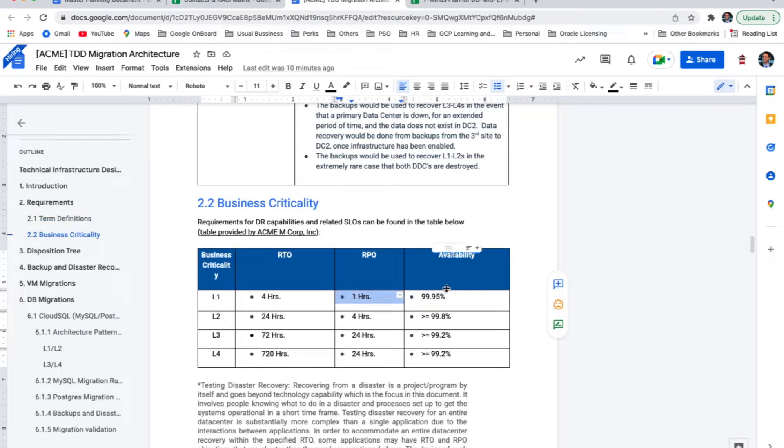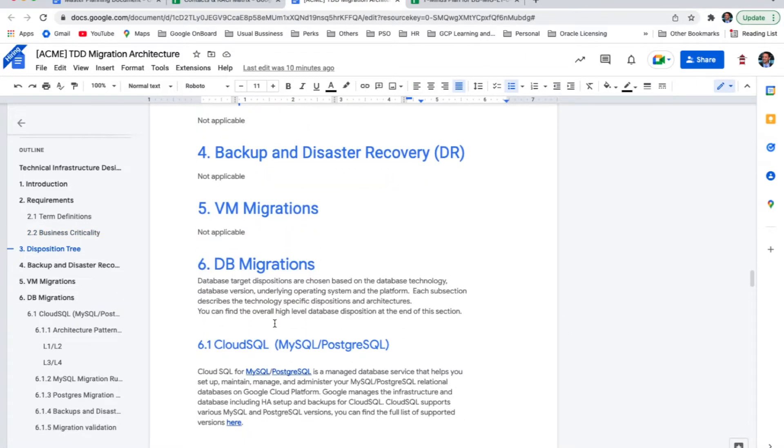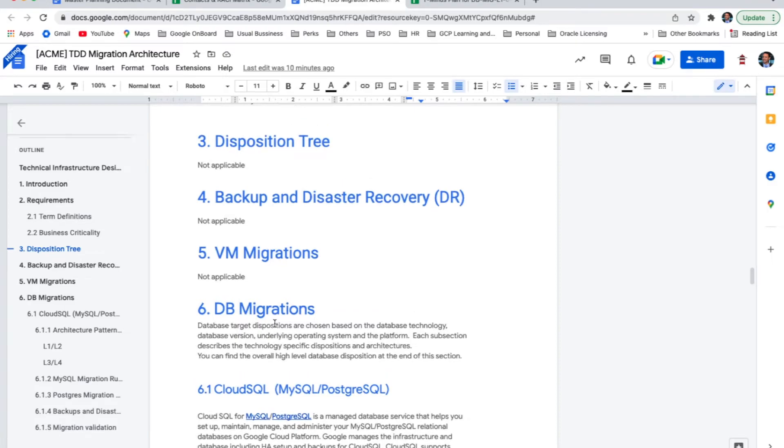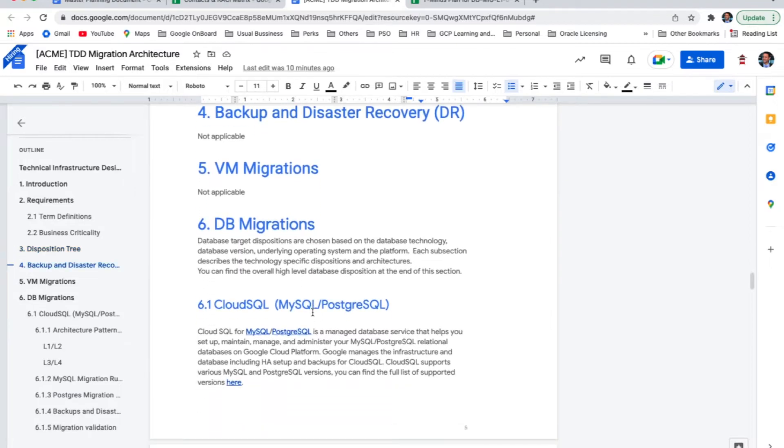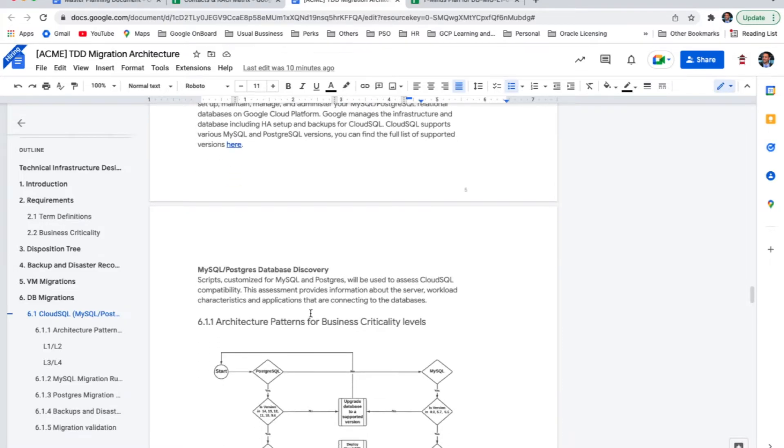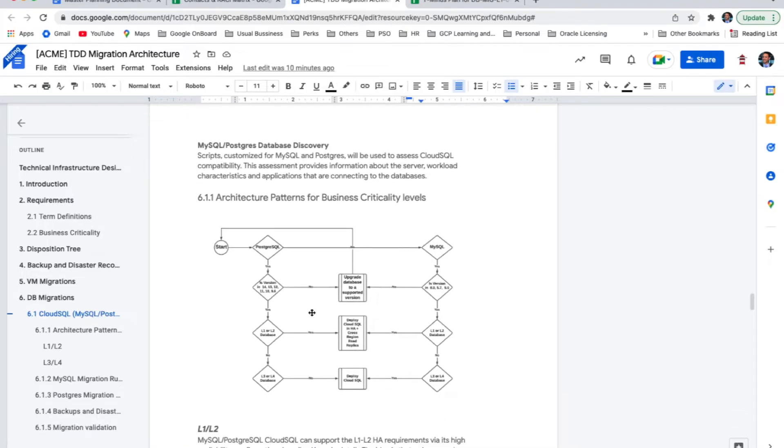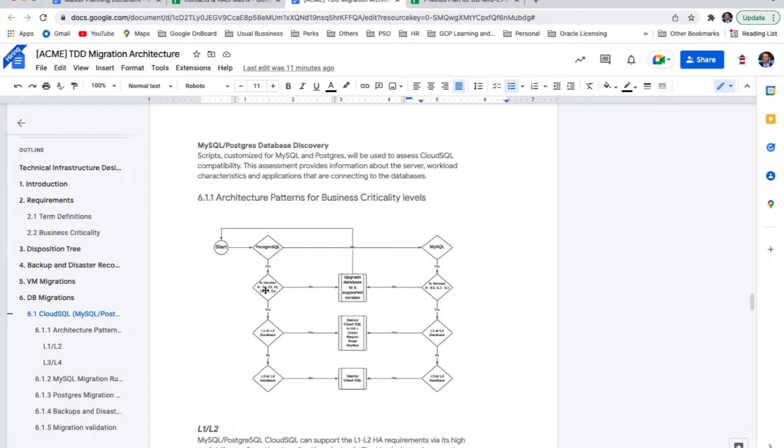Next, we have the business criticality. This is very important and usually is done in the assessment phase. In this example, we have four categories. In these four categories, they are using three attributes to determine how to classify and how to identify each one of them. For instance, L1 means an application or a database needs to comply with four hours RTO, one hour RPO and have 99.95% availability. Next, we have DB migrations and please note some sections were intentionally left blank just to showcase that you can include your own sections there too. Cloud SQL, MySQL and Postgres. So at this point of the TDD, now we want to show how to decide whenever we are assessing a new database, how to decide the target design for it. Let's go through this example. We found a new database. Is it Postgres? Yes. Is this within this database version list? If no, the database must be upgraded to a Cloud SQL supported version before it can migrate it to Cloud SQL.